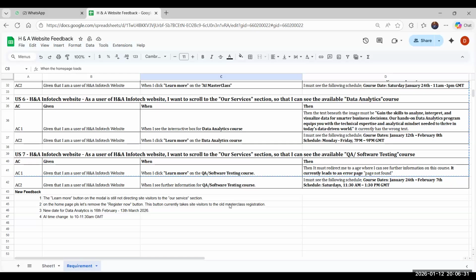But on Jira, I understand that each user story literally represents a size of work that needs to be done, so it should have its own unique sizing. If you go to that blue button where you have the user story, you will see on the extreme right it shows sizing. Each of them should have their own story points that you can assign, so it's unique for each user story, and then each user story gets dragged into the epic for the sprint planning and all of that.